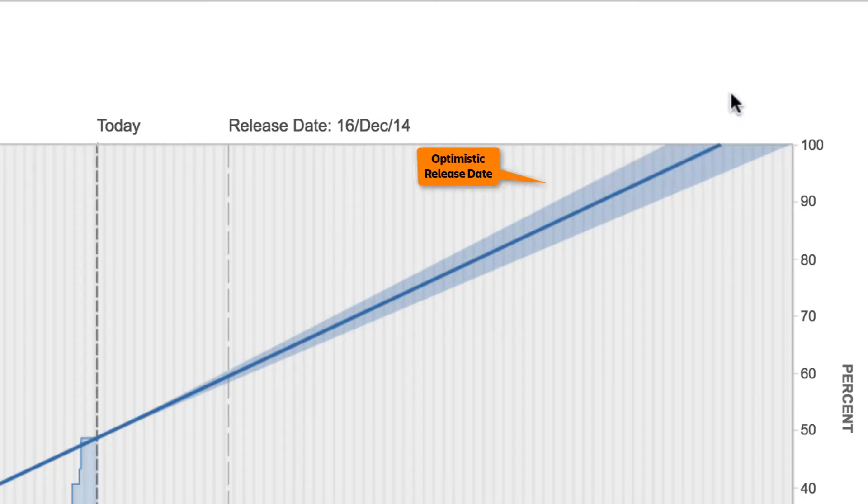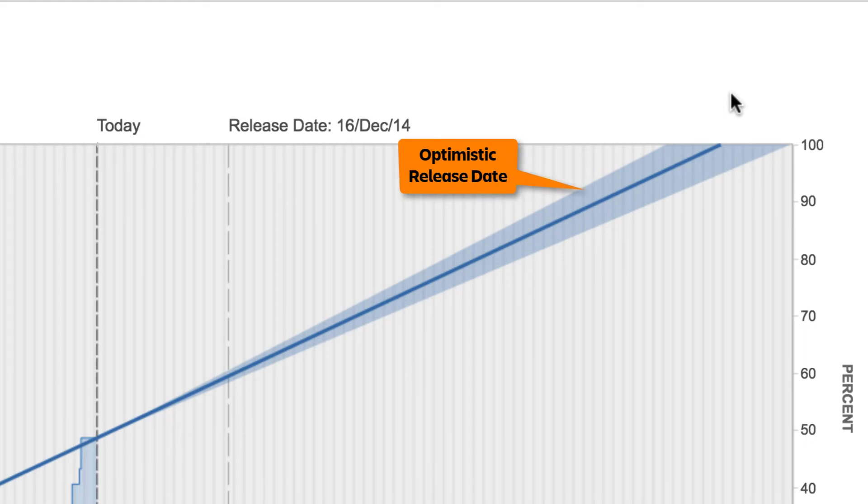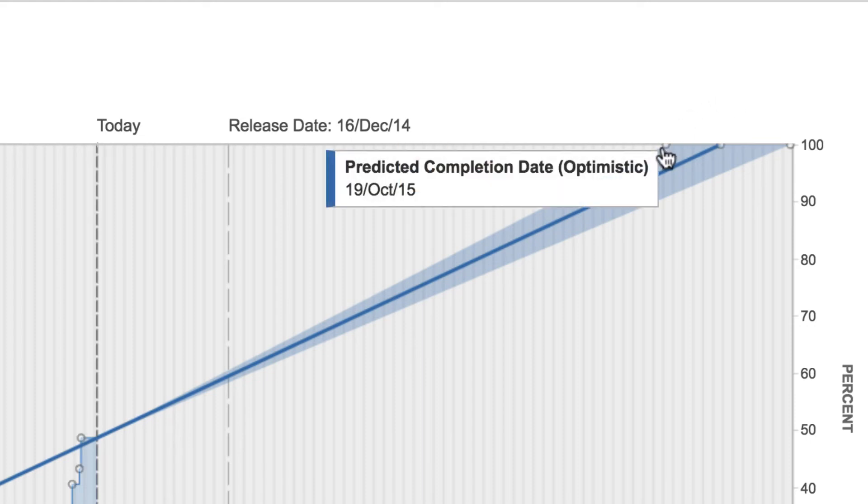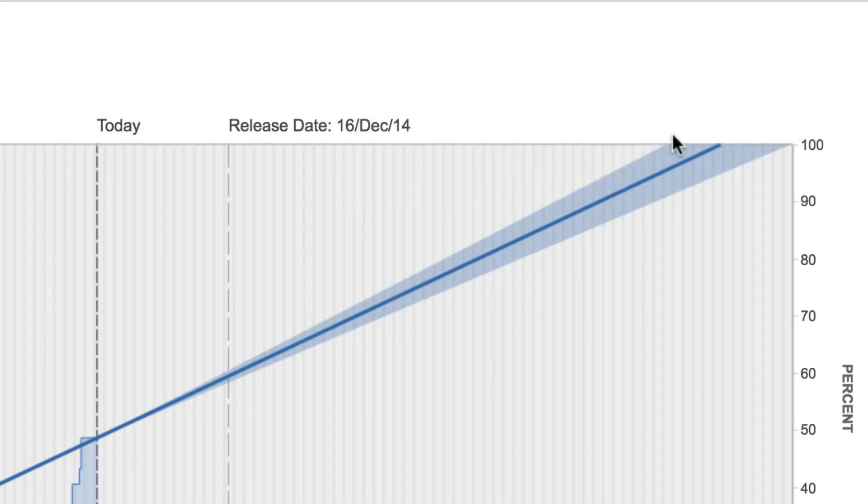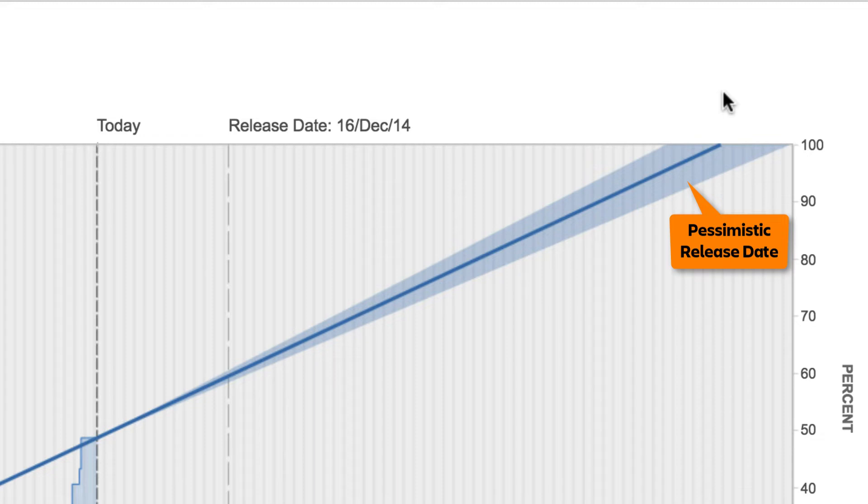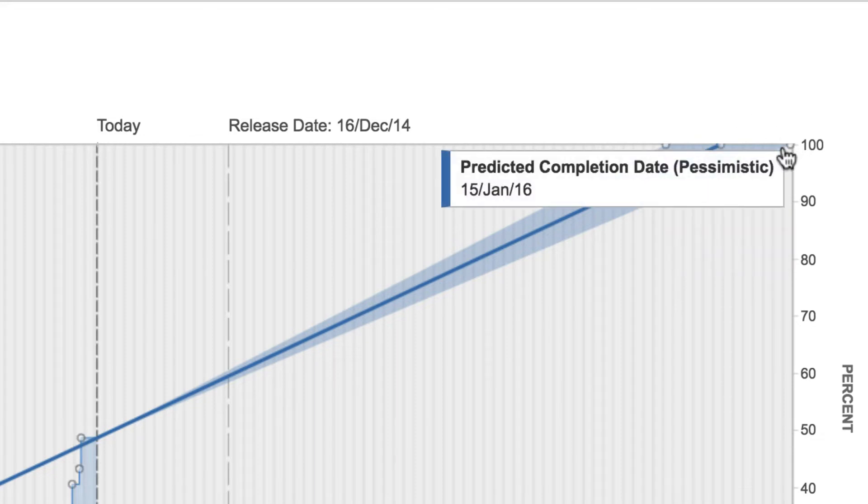The shaded blue area to the left of the line represents the optimistic predicted release date. This is the earliest date you may expect the version to be complete. The shaded blue area to the right of the line represents the pessimistic predicted release date. This is the latest date you can expect the version to be completed.